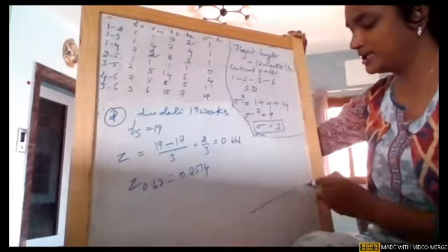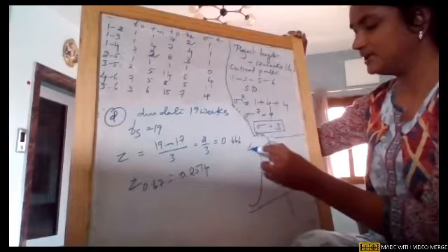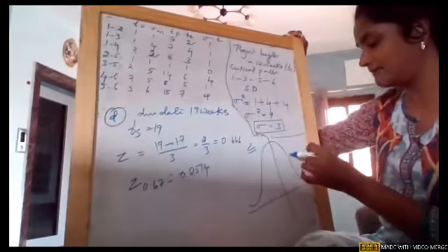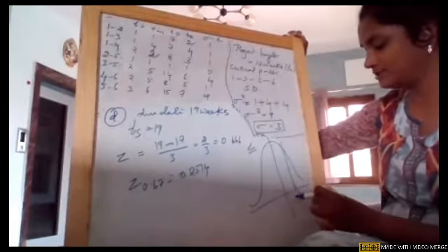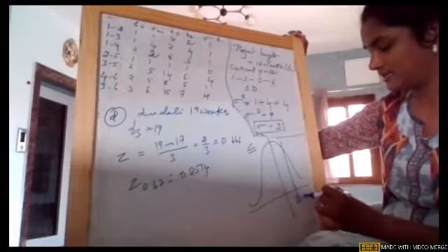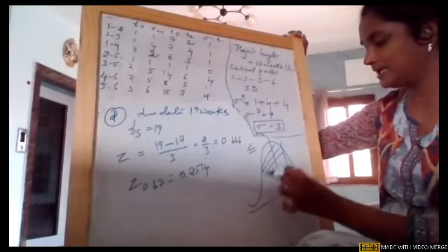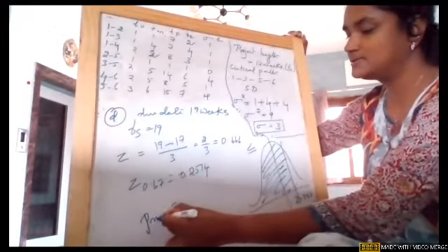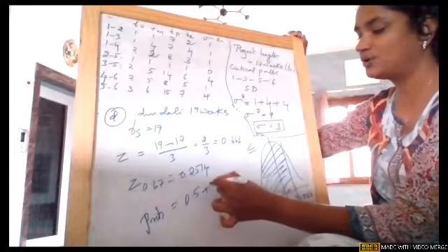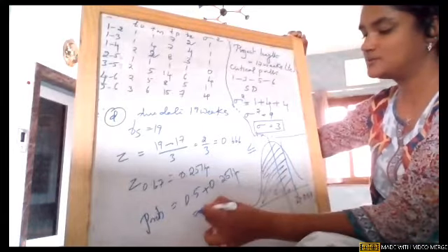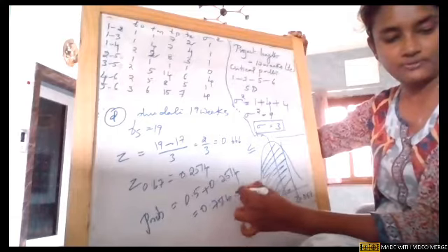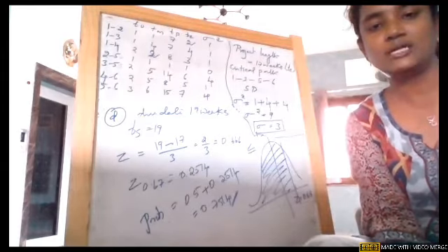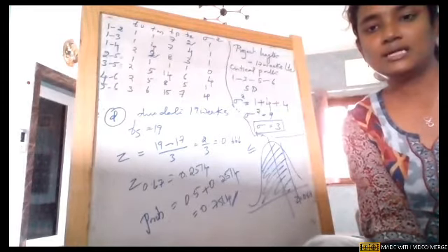Because it is the due date, girls, it is less than or equal to, not beyond that, that is the only maximum value. As I again have a positive value, so less than or equal to, this is Z at 0.67, so with this the complete area comes into the picture. So again the same thing, the probability is 0.5 plus 0.2514, which is 0.7514.